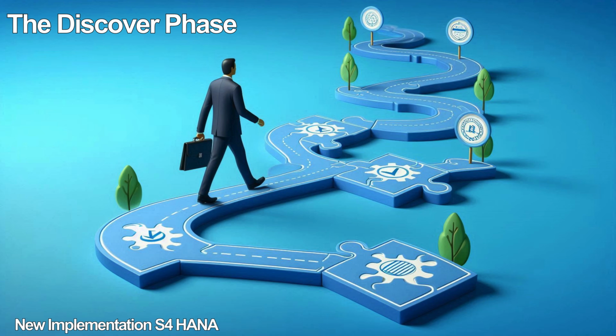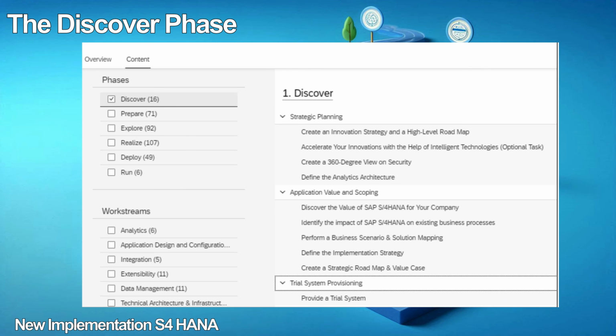The discover phase. It's important to understand that the project hasn't started yet. In fact, the project is non-existent during this phase. Throughout this phase, the leadership team will build the digital transformation strategy and multi-year roadmap and will exit the phase after deciding on the delivery approach, the transition path of choice and possibly the delivery partner. By the end of the discover phase, the sponsor approves the project and the resource assignment starts.